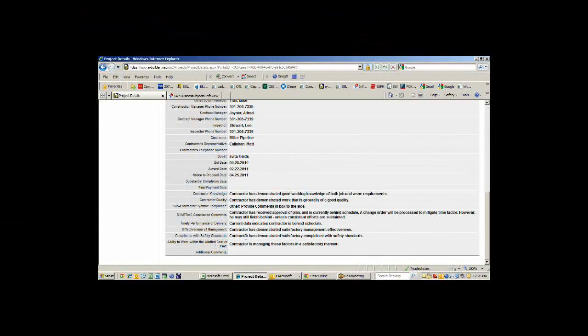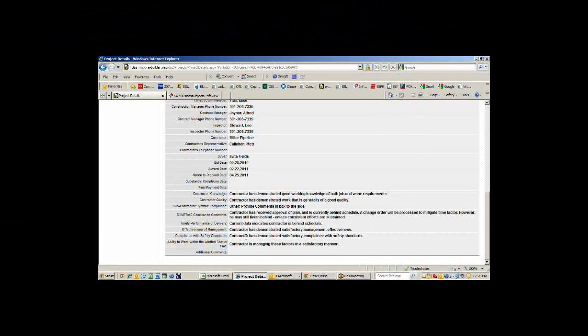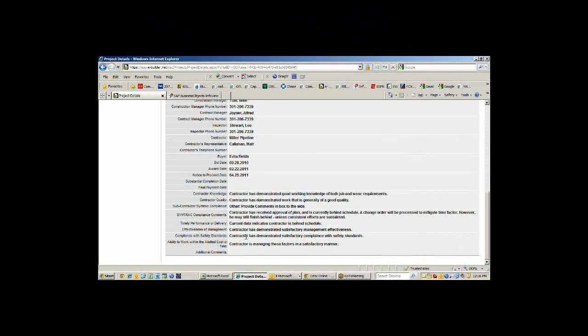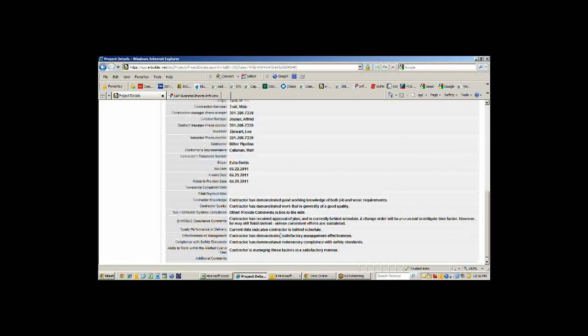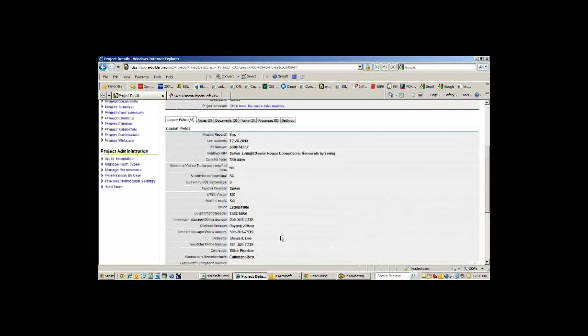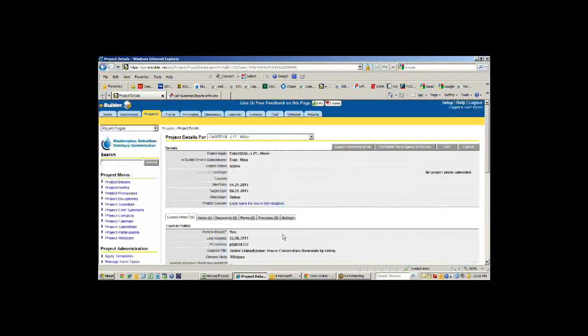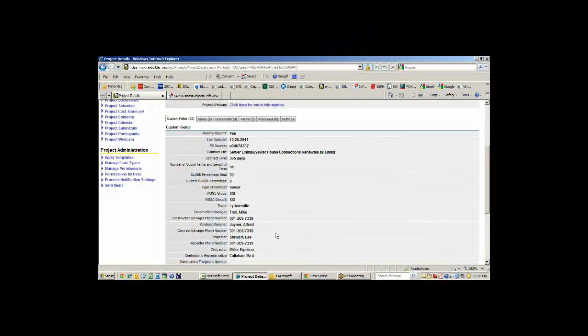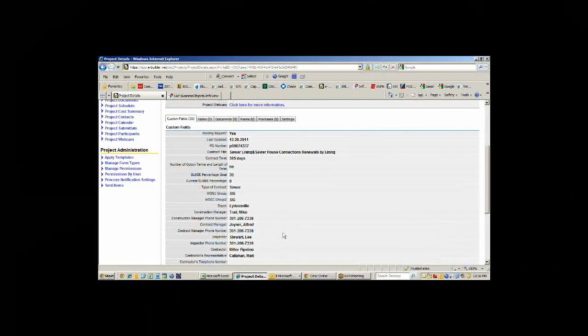We fill out all this information on a monthly basis, and that gets rolled up into a report I'll show you in a little while. That gets sent up through our upper management to the GM. This is updated by the contract manager on an as needed basis, but not less than once a month.